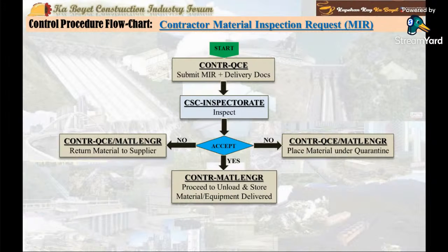Step 5. The consultant and contractor should maintain an updated material receiving inspection log registry. Step 6. The contractor shall issue a weekly updated MIR summary report to consultant, the project architect engineer, the QS consultant, and the designer.